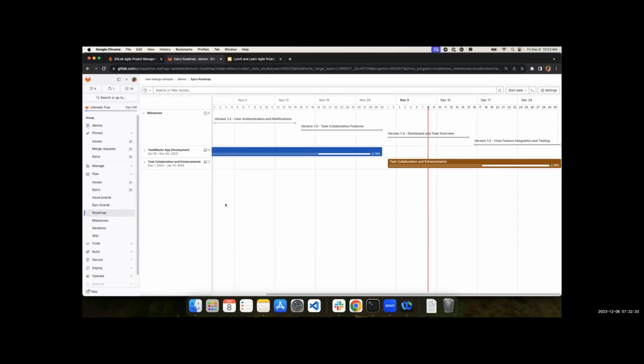A roadmap within GitLab serves as a schedule, effectively communicating planned solution deliverables across a planning horizon. You can visualize it as a timeline, as roadmaps exhibit epic timeframes, enabling a clear vision of the project's trajectory. So as you can see here, we can see the different timelines, the different milestones that are associated to a specific project. Let's deep dive into epics.